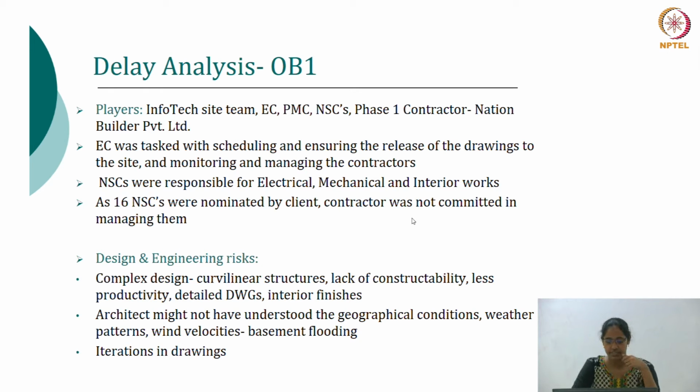The engineering consultants were tasked with scheduling, drawings and other works, and the nominated subcontractors took care of electrical, mechanical and interior works. The subcontractors were nominated by the client itself, so the contractor was not happy, since he could not coordinate with them well. The coordination between the contractor and subcontractors was poor.